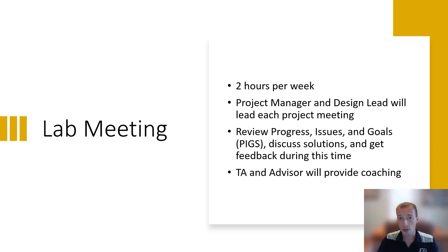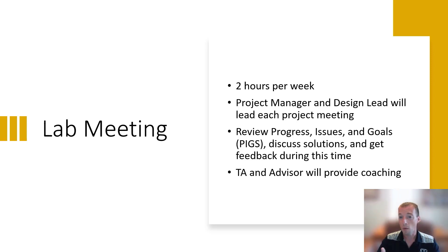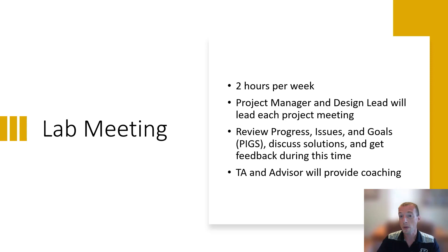There's a two-hour lab meeting each week. During that time, your project manager and design lead will be taking the lead in the class and going through a status report — what we usually format as PIGS: Progress, Issues, and Goals. Through the Progress portion you're going to talk about what you got done over the last week, celebrate your successes, and show those to the class. Don't just say 'hey we got items one, two, and three done' — do a demonstration. If you created a CAD model, show the CAD model. If you did an assessment of user needs, put those up on the board and show them — whatever it might be, show and tell your work during this time.